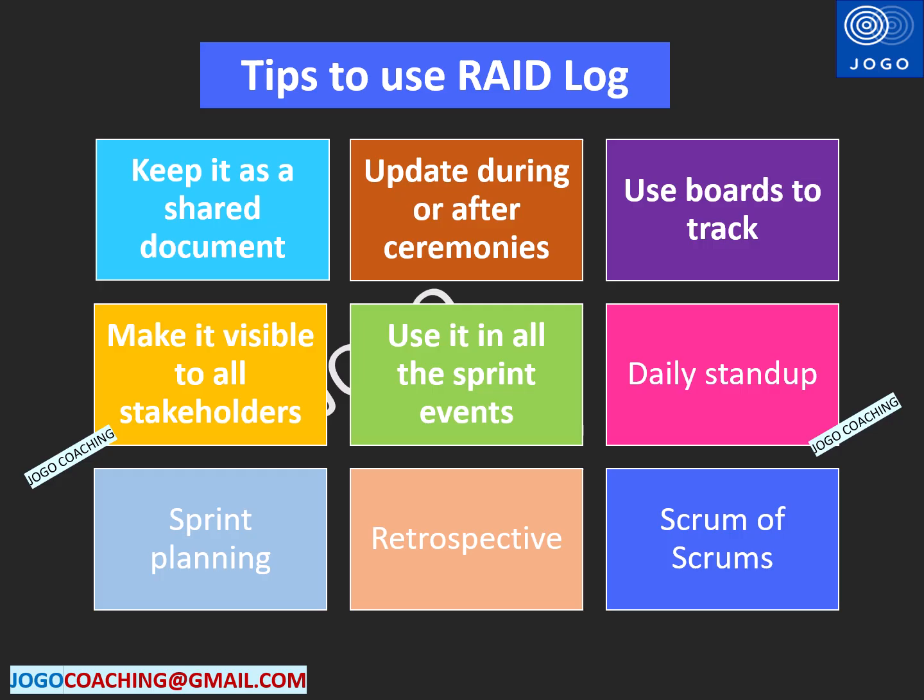The next one is during Scrum of Scrums. If we have multiple Scrum teams working on the same product, a RAID log will help in managing cross-team dependencies. Or within the team also, between the team members, we can manage the dependencies in a small team. So these are a few tips and situations where the RAID log will help the team deliver quickly without any issue. I will post the next video with 25 examples of RAID log scenarios from real-time projects.